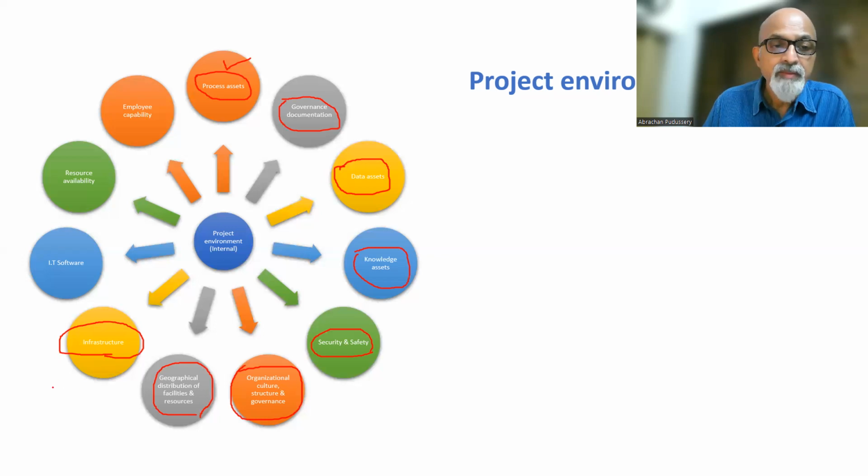impact the project performance. Then the software tools used. For example, somebody may be using Primavera for the project scheduling. Somebody else may be using MS Project. Somebody else may be using Google Sheets, and sometimes there is a need for these things to integrate and talk to each other. And if that doesn't happen, then monitoring and controlling can become an issue. So before project planning, we need to be aware of the software systems used by the owner, the contractor, the subcontractors, the suppliers, and the consultants.